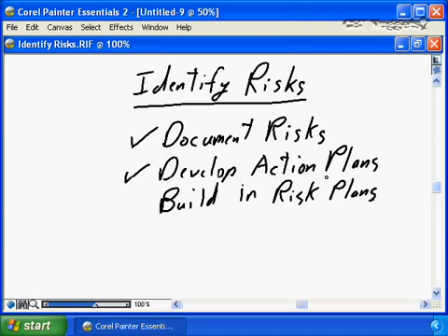What can we do about training? Can we proactively provide training? Can we have a training program in reserve should the training issues come up? Do we need to allocate additional funding to our project to deal with the additional training? What happens if materials are late? Can we have a standing offer with a second supplier to deliver materials if our primary supplier is late? Can we buy insurance? Can we pay a premium to get a guarantee from our suppliers?